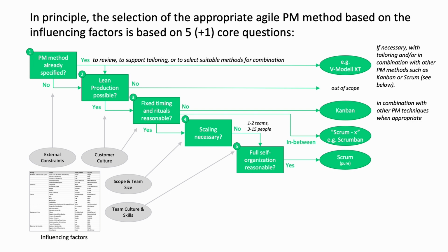In this sense, a Scrum minus X, but also an addition of the above-mentioned lean or Kanban principles, especially in the form of boards with explicit work in process limits, and with several columns supporting the flow and the pull principle.